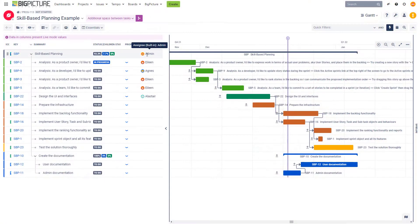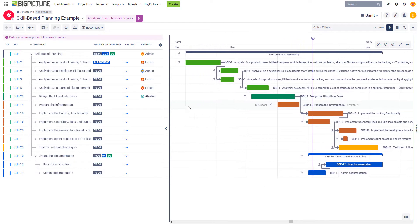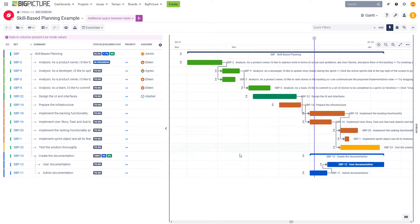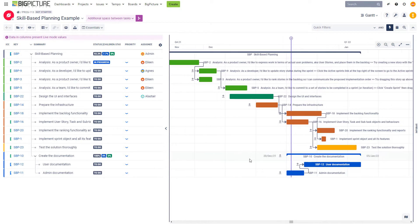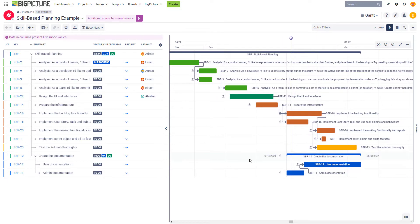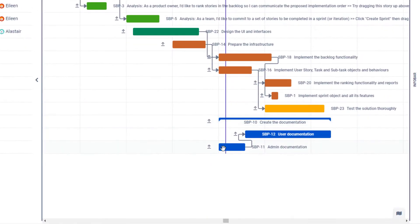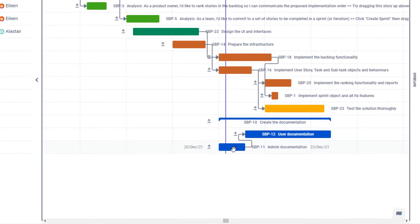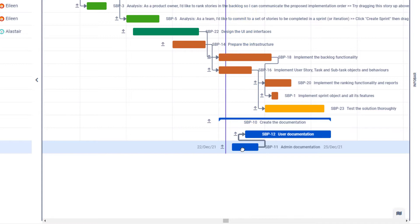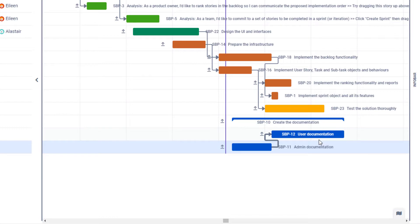So let's see what we can actually do in this scenario. The first thing that's definitely worth having a look at is that when you have elements in your project plan, you can of course move those elements on the timeline. I'll move one of those elements—I'm looking for a good candidate over here. I think I'll try to move this one. I'm going to move this element a couple of days forward, and as you can see, it immediately started a consecutive action that also moved this element forward because it's a follower of the element that I touched, and it also moved the parent of both elements because of the mode that we're currently using, the automatic mode.